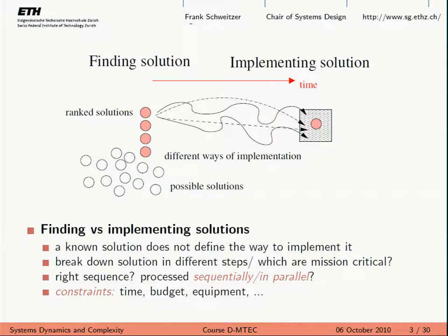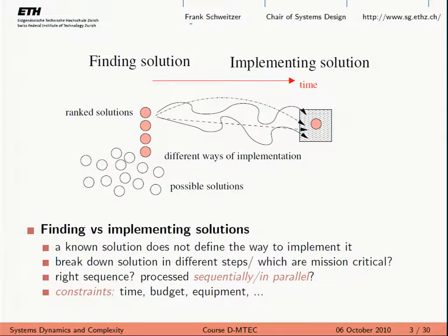A good example for such a decomposition of a problem is your master thesis. You don't start writing it in one go, in one night — you have to divide it into sub-problems. Once you have this, you can start thinking: can I do everything in parallel? For instance, you may do section one — literature research — in parallel with section four — experiments. Your experiments can be running at the same time you're doing literature research. But in some other cases you need to do your literature research before you can even start thinking about your approach. So this is the kind of project we're going to be concerned with.